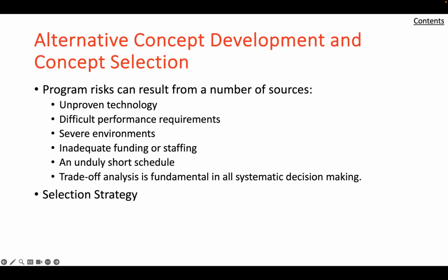Three, for the next stage of evaluation, examine the list of performance and compatibility requirements and select a subset of the most critical ones that are also the most likely to reject unsuitable system concepts. Include consideration of growth capability and design margin as appropriate.